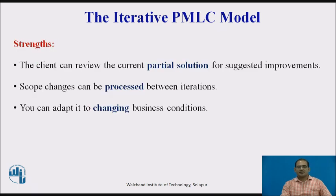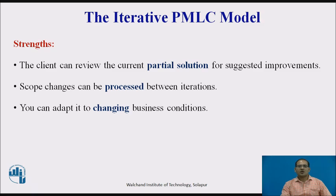The strengths of the Iterative Model include that the client reviews the current partial solution for improvement — there is no substitute to experiencing and using a partial solution for the client. This continuous review by the client tends to keep the solution aligned with business needs. It can also process scope changes between iterations, and you should try to stay in control by presenting the client with alternatives and ideas at each iteration. Projects are required to adapt to changing business conditions.